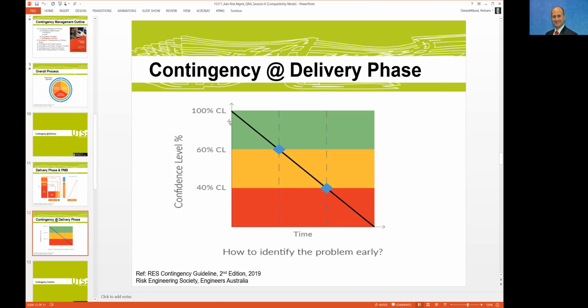Generally, when contractors start the project, we are sitting on 60% or above in terms of the confidence level. There is a possibility that the projects, because of a number of reasons like variations or changes, delays, procurement, the confidence level goes down and down and down.